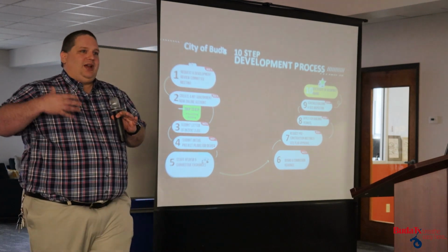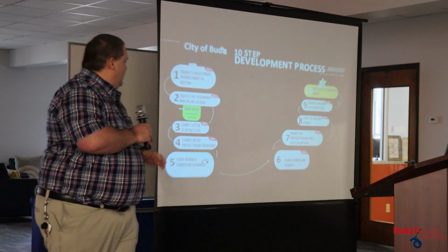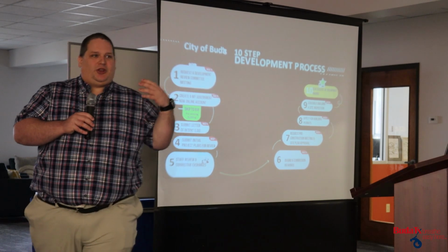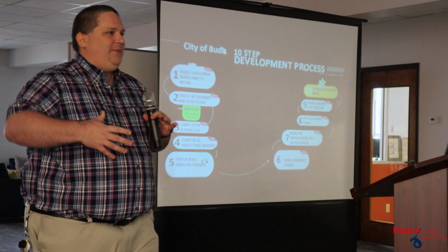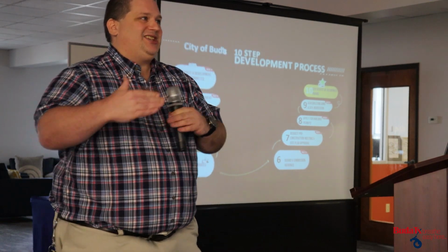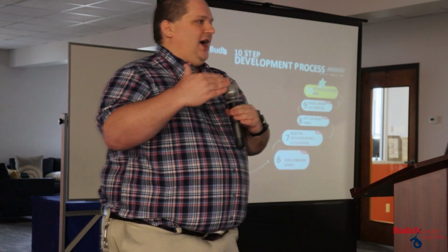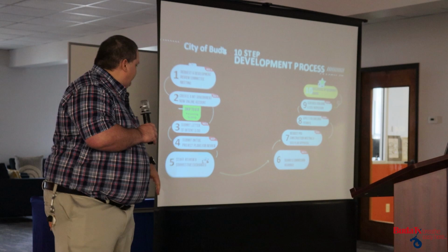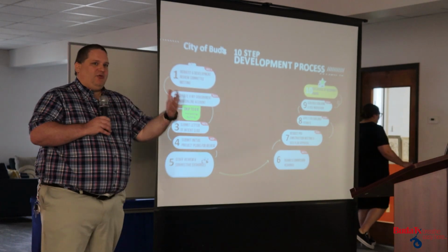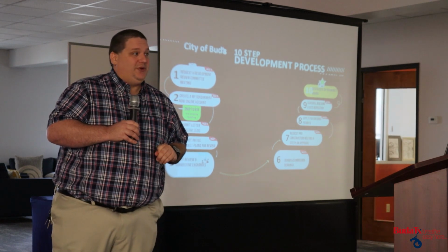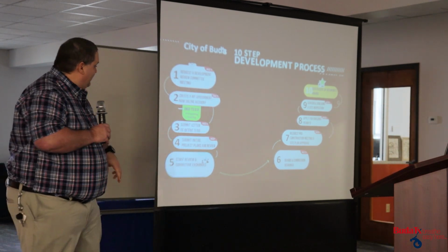If you are doing something a little more intense, we're going to have you submit what's called a letter of intent, where you're going to go on My Government Online and you're going to say, hey, this is what we want to do, this is the timeline we want to do it in, this is the process that we want to engage with. And then if it looks like something that's going to be very intense, we're probably going to schedule another meeting with y'all called a scoping meeting.